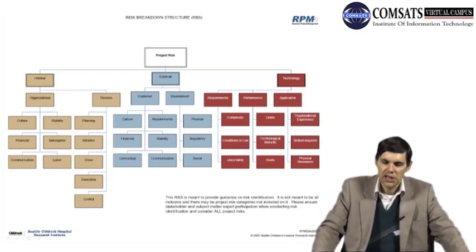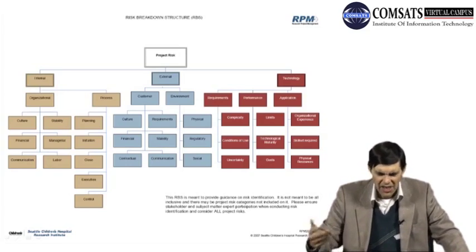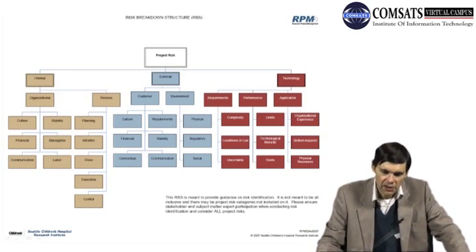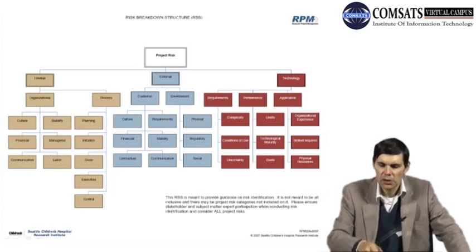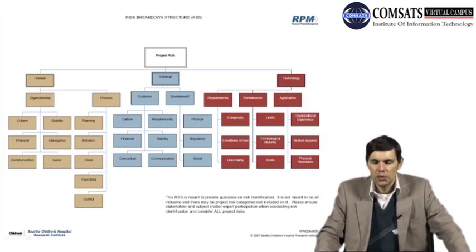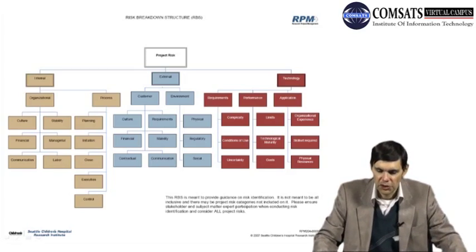The laws might change and that might make it more difficult for such institutions, and so forth. So you have here a whole risk breakdown structure, and you have to look at that. You have to assess these different risks, you have to prioritize them, and then you have to come up with strategies for each of them, how you are going to do that. Of course, it's the stakeholders who have to perform this function here.